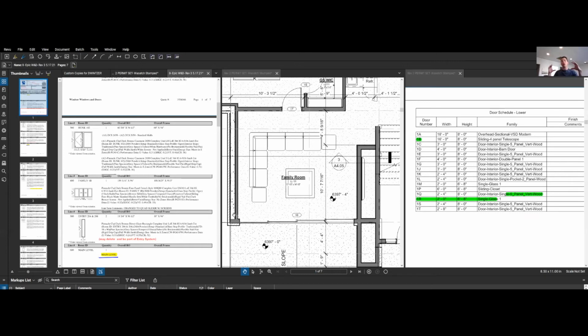Some of these we made smaller because, for instance, you can see right here, this is 4 panels, and these 2 go out. So it's 2 doors that are open. Where we originally had bid, it was 3 doors that slid all the way into each other. And that was just a bigger cost. It was about $3,500 more that we just didn't want to pay.